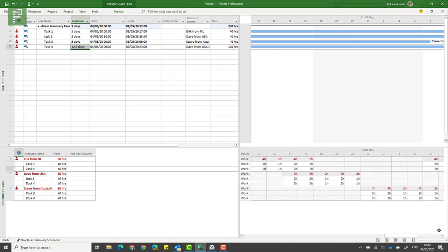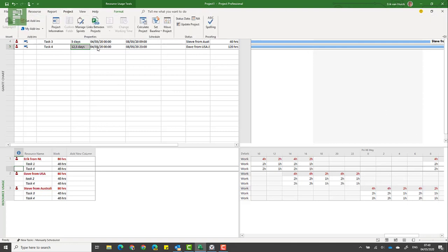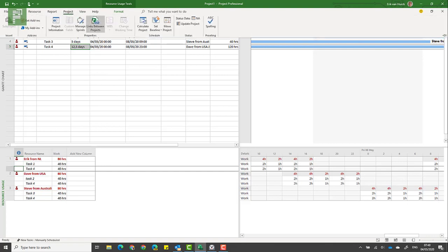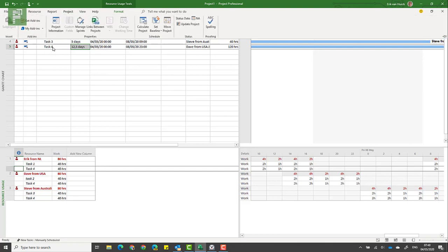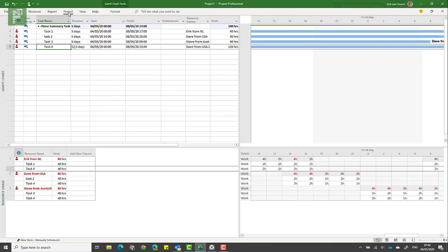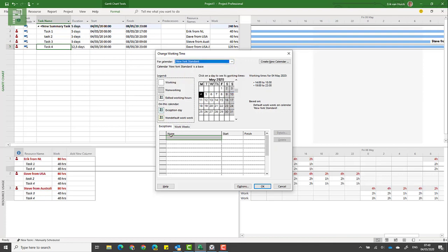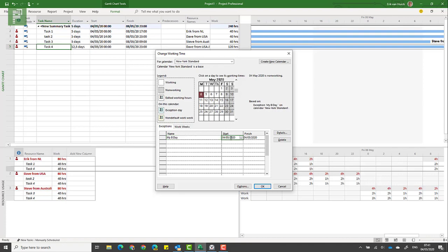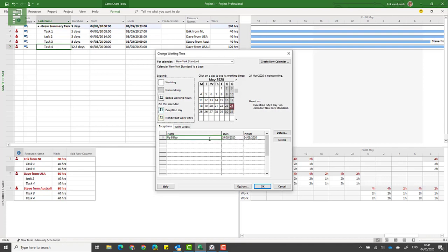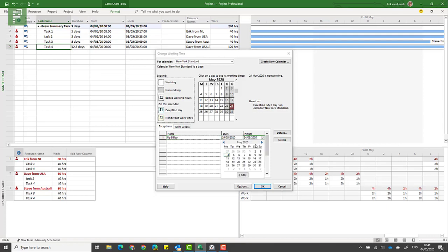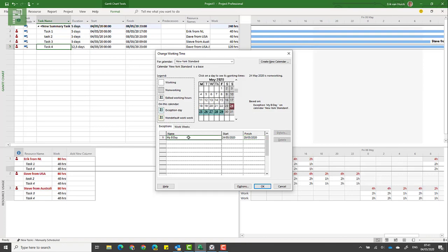So that's it for now. This has been a wonderful exploration of time. One final note: if you do want to have exceptions in there, you would just go in and click on New York Standard, and let's say my birthday is a national holiday in New York. Sorry guys, it's on a Sunday this year. That's just too bad. So let's say we start celebrating on Sunday and we continue celebrating until the end of next week, and this is now a holiday for New York.